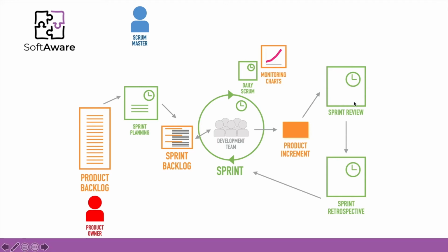And then a sprint review occurs. Inside of a sprint review, everyone gets to look at the product increment, everyone gets to look at the product backlog, and analyzes what was already done and what wasn't done. Then a sprint retrospective occurs for the Scrum team to know what went well and what went not so well inside of a sprint regarding the relationships, the people, and the work conducted. And a new sprint starts with a sprint planning, a sprint backlog, and so on and so on.